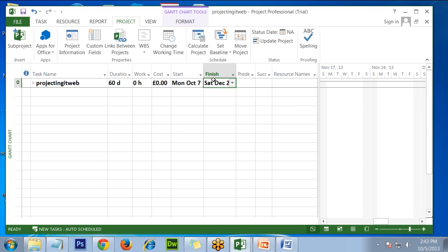However, we haven't yet thought about resources. We haven't yet created resources on our project. When we start assigning resources, chances are either the project goes beyond this date, or it can even come forward, depending upon whether you have enough resources in hand, and whether they are even available. The typical thing about resources is they are not available, right? There is always one developer, one tester, and so on. You are always running low on resource bandwidth.